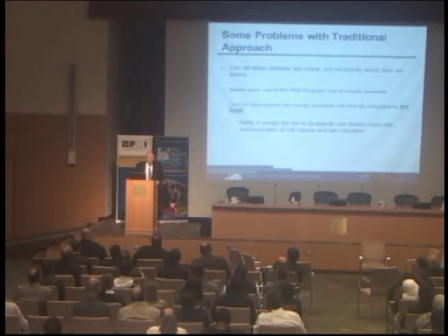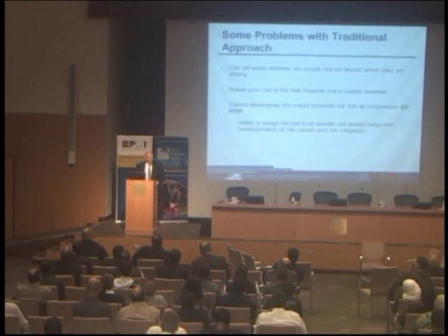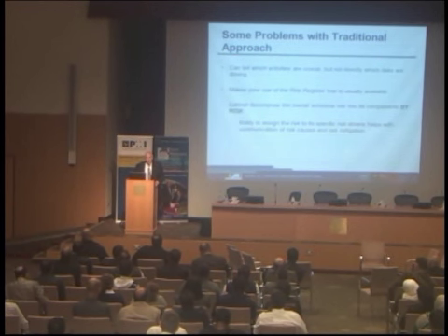Why do they do this? Because in a workshop setting, they can't talk about these things. That's how the risk register was developed. But in private, confidential conversations, that's when they can be honest and confident and straightforward and understand that they will not be punished. All of a sudden, we get new risks that are not in the risk register.